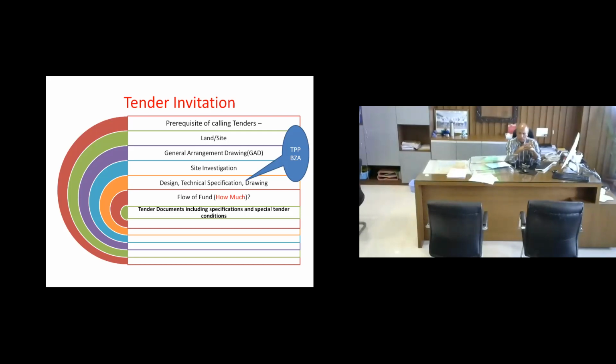If we look at our experience in setting up a plant, we don't have that expertise because our job is different. So once the job was given to railways, say in the month of December, our general manager at the time got a call from the board asking South Central Railway to go ahead with setting up the thermit portion plant. And immediately the letter also followed from the board. So we took almost 2 months to prepare a detailed project report on how we are going to do it, because we had no idea. And then we sent the DPR to the board. The board said okay, DPR is fine, South Central can go ahead. In the month of April, they sanctioned the work, probably in 2018.